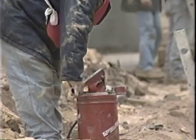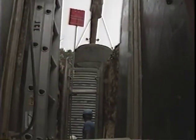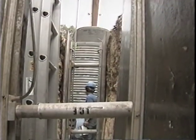Well, it looks like that's going to be the case through this stretch of the project. We'll need to give our consultant some lead time on this. You know, depending again on soil conditions, we could use an aluminum hydraulic shoring system. It might make things go faster through this part.